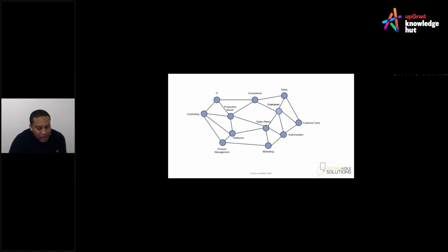Okay, so Rose has asked how to determine whether a software project should go with Scrum or Kanban framework. And this is very interesting. Now, I've asked this question and have been asked this question many a time. And people say that Scrum is very good for project work, but where you're doing items one by one, a lot of people will go for Kanban. So where it's more like system support and you're picking up tickets, Kanban works great in that essence. But where you're doing projects and you're trying to work on 10 items at any given time, Scrum works absolutely phenomenal for that.